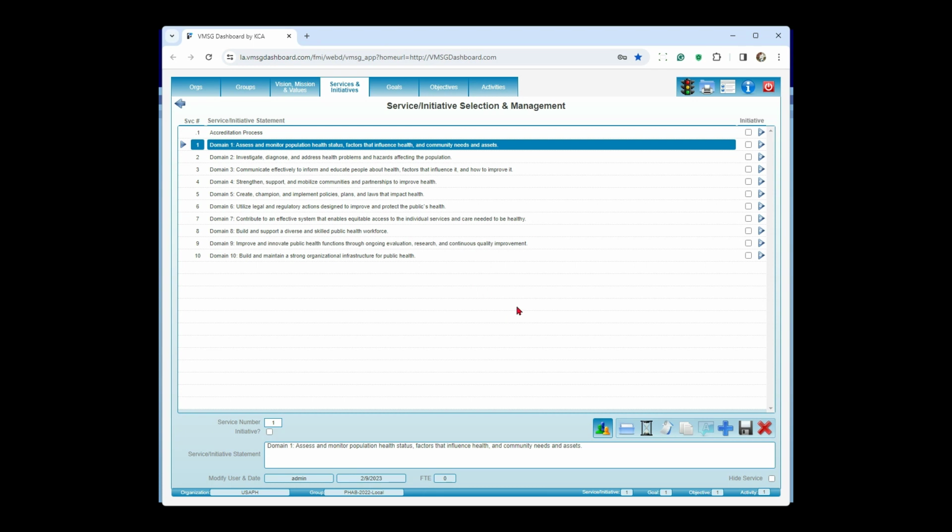The other thing is at the activity level, we're going to set the dates. You're going to tell us kind of a beginning date, could be anything you want, but the ending date is typically somewhere around a month before you're going to submit documentation up into EFAB. And it just gives you a little breathing room in there. When we do that, we turn on real-time planning. Everybody who's a domain lead or been assigned as an activity lead is going to start getting email notifications, again, typically on a monthly basis. That email notification is going to link them right back into the activities and objectives that they've been assigned, so that they can keep track of them, update them, get the documentation attached, everything that they need to do.